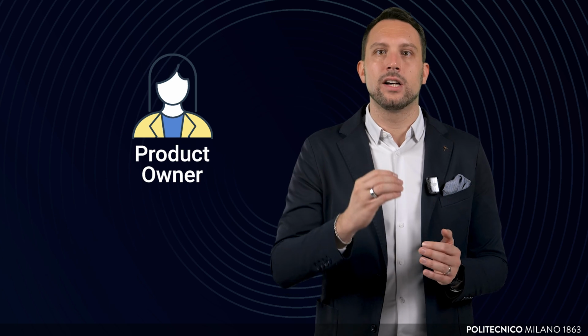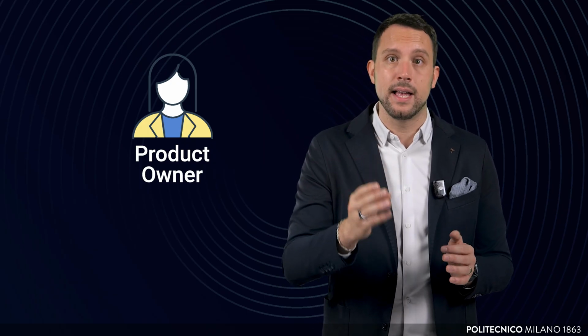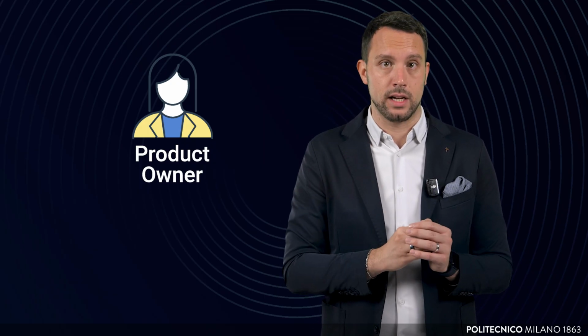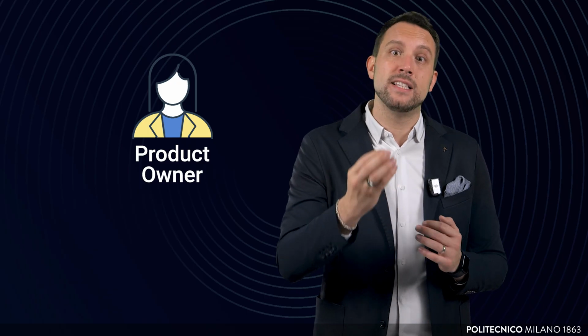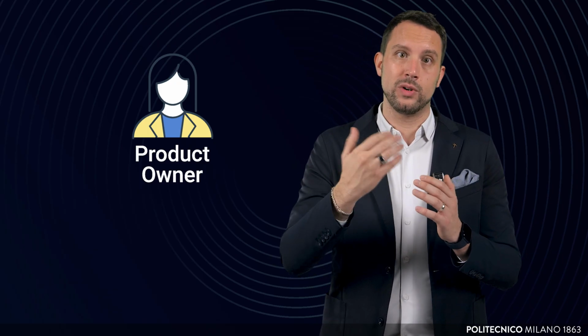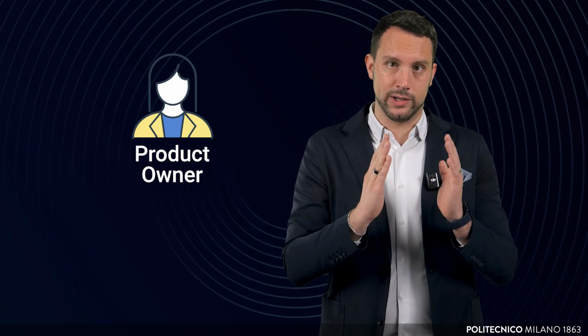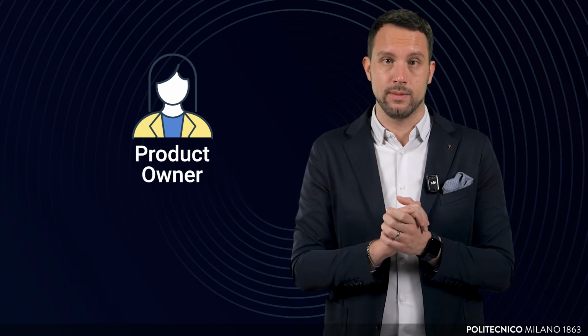For instance, in the context of a MOOC platform, the product owner might prioritize building a user-friendly course catalog over implementing advanced analytics based on student feedback. They must clearly explain this priority to stakeholders in terms of business value, while also translating it into actionable user stories for the team, like create a searchable course catalog with category filters.